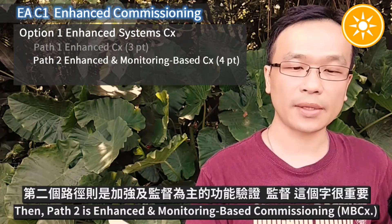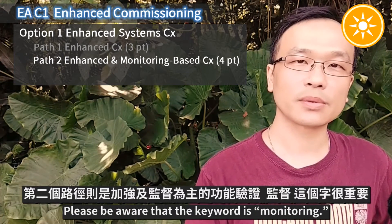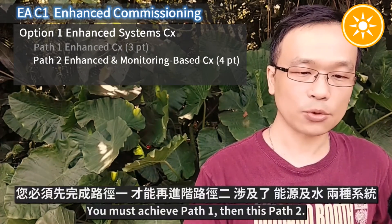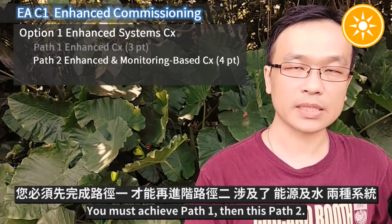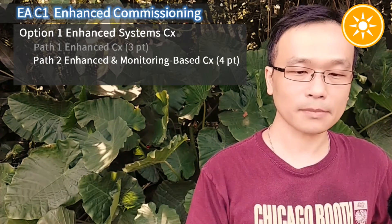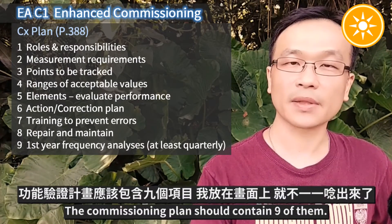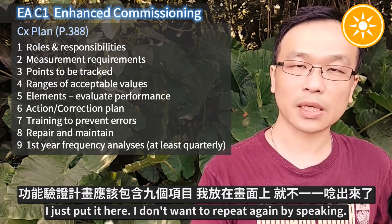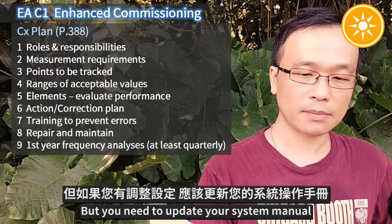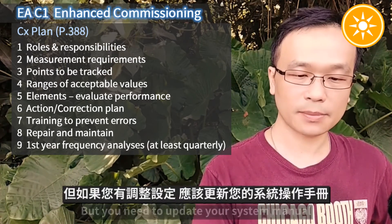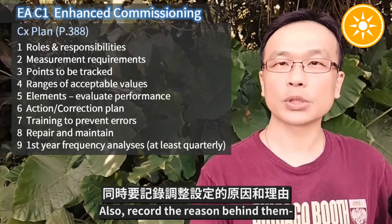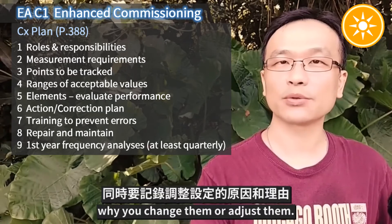Pass two is Enhanced Monitoring-Based Commissioning. Please be aware that the keyword is Monitoring. You must achieve Pass one first, then at least Pass two. It focuses on both energy and water-related systems. The commissioning plan should contain the items shown on screen. You need to update your system manual with modifications or new settings, and also record the reasons behind them — why you changed or adjusted them.